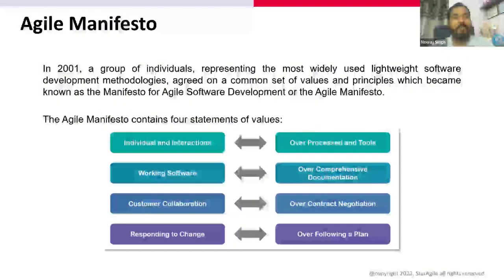So Agile gave importance to working software as the primary measure of progress. It said that if you have not implemented anything in this sprint, then you have not progressed at all on the project. Anything meaningful which is developed is the primary measure of progress. The number of days or number of artifacts prepared is not something that tells a customer we have been progressing with the project.